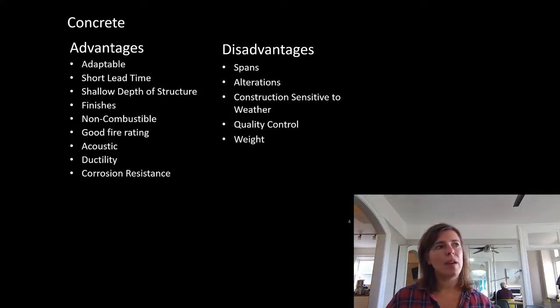There was a super warm winter in 2011, 2012, and the construction industry was basically able to work all winter long. The next year we had record cold weather multiple times, and at the time I was working in an office right beside a concrete building under construction. They basically stopped work for a month and a half.